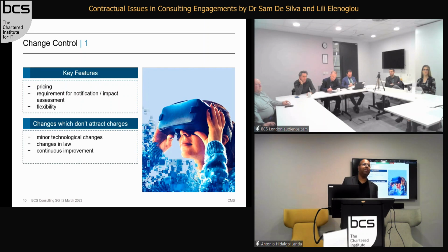Yeah. Although, even if you can see it, if you accept that, then you need to build that into your pricing. If you accept an obligation that the software will comply with law, you need to do that sort of future forecasting and horizon scanning and say, okay, we know that's coming in, so there will be further development. We need to charge for that. Yeah.